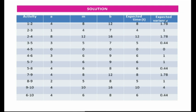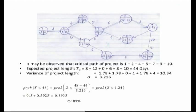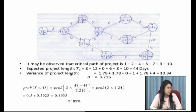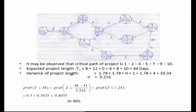To answer the remaining questions, here is the network diagram. With the help of this network, we observe that the critical path of this project is 1-2-4-5-7-9-10. We can confirm this by looking at the earliest and latest times associated with all these activities — they are the same: for example, (1,2) gives 8, 8; (2,4) gives 20, 20; and so on. The expected project length is the sum of all activity durations lying on the critical path.